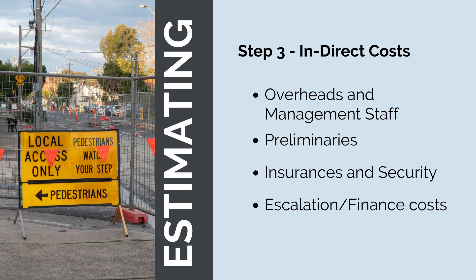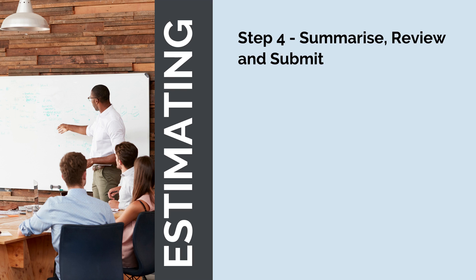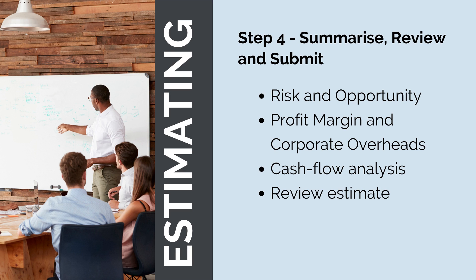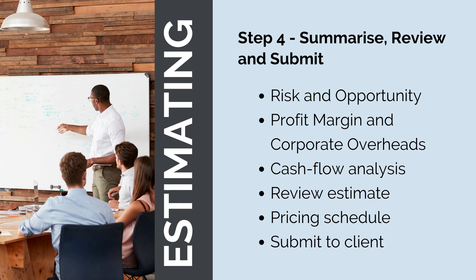Once we've priced our direct and indirect costs, we've got our total project costs. The next step is to summarise, review and submit our estimate to the client. We need to first complete our risk and opportunity assessment — understanding our known unknowns and unknown unknowns to work out a reasonable amount of contingency funds. We'll then add a profit margin and corporate overheads to calculate the price we submit to the client, and complete a cash flow analysis to ensure we're cash positive. Before submission, the estimate will be reviewed by management to ensure accuracy — for example, that a $200 million bid won't result in $250 million in actual costs. When everybody is happy, we'll fill out the client pricing schedule and submit the estimate.